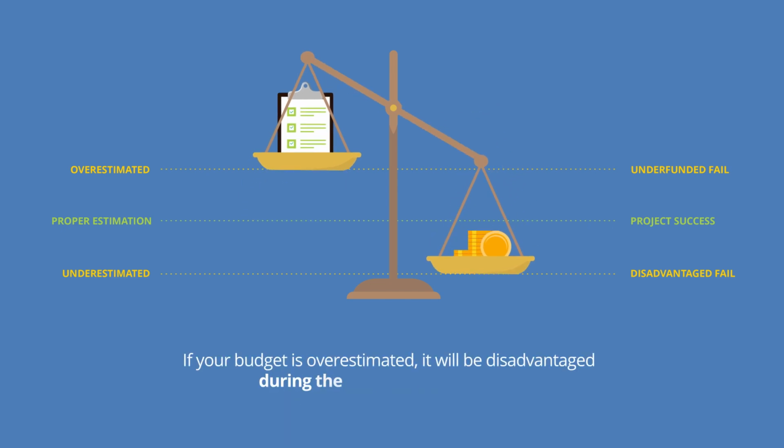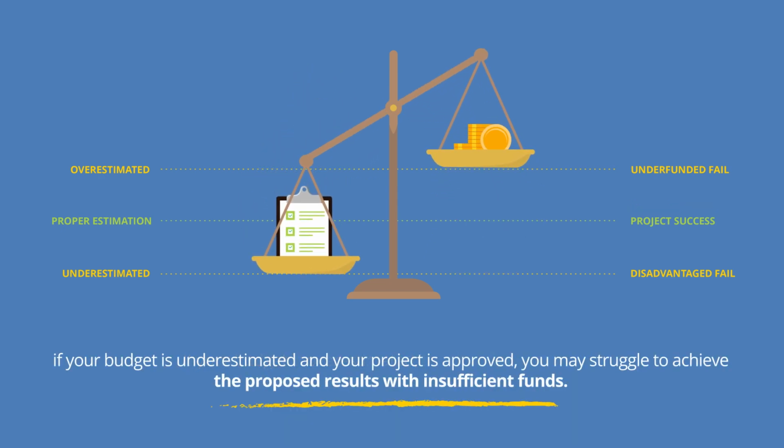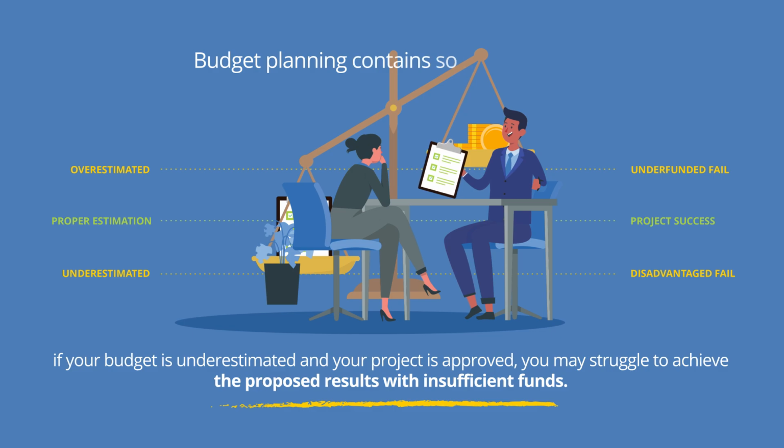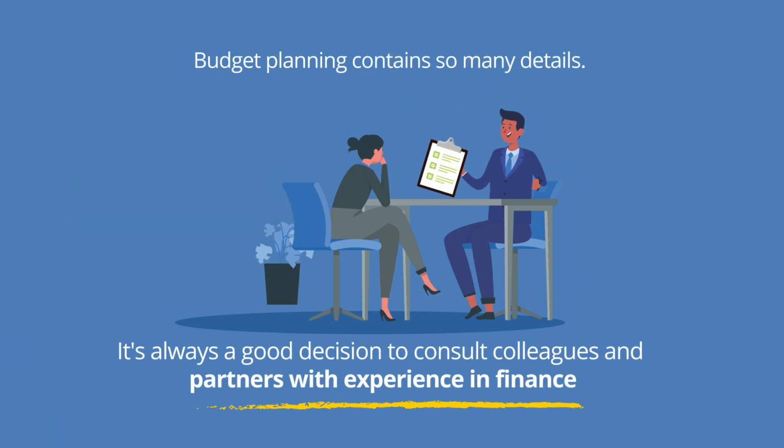If your budget is overestimated, it will be disadvantaged during the proposal assessment. On the other hand, if your budget is underestimated and your project is approved, you may struggle to achieve the proposed results with insufficient budget funds. It contains so many details. There are so many costs to plan: salaries, meetings, travel, and other interventions.